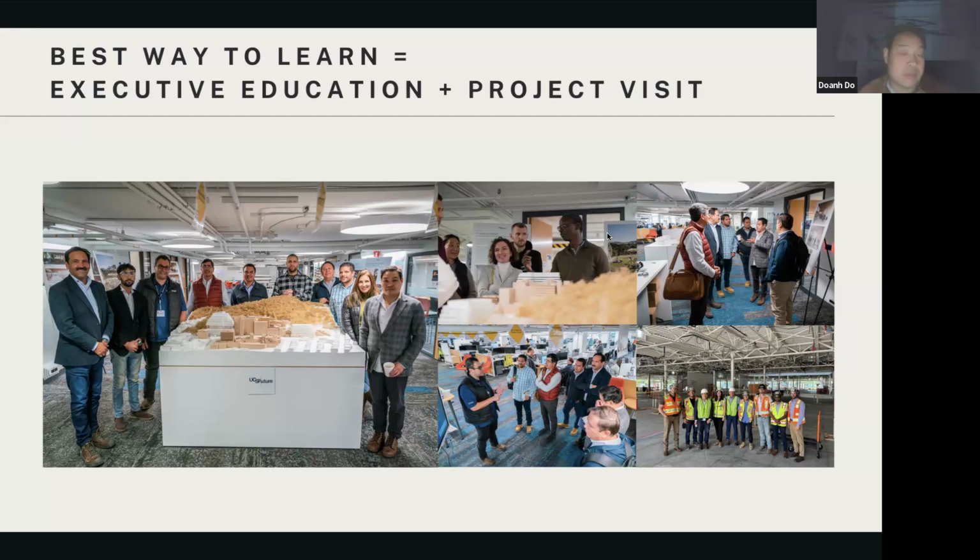So there is an economic reason for the more savvy owners to do these things. I would always go with the owner, and I would find the owners that have the biggest and most complex projects. They're usually the ones that listen the most because they know how expensive a day of delays is. And if you want to try something on your project, I would start with daily huddles.